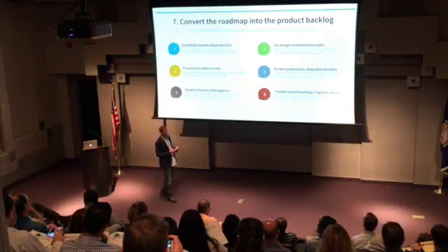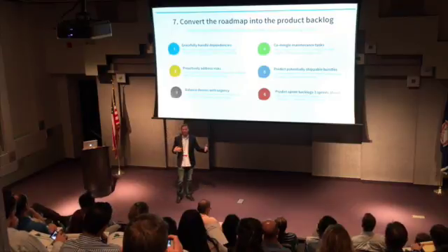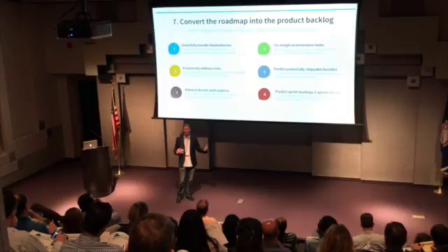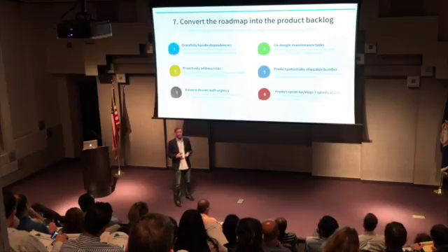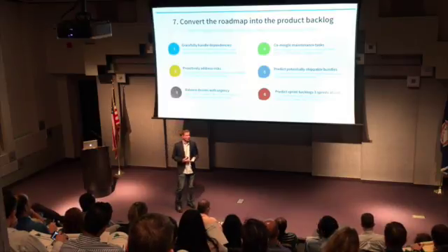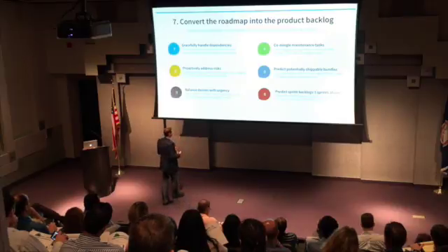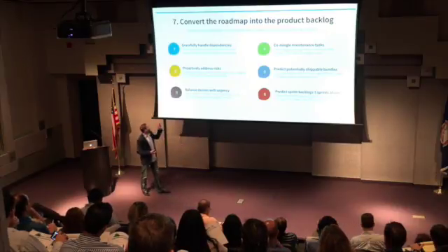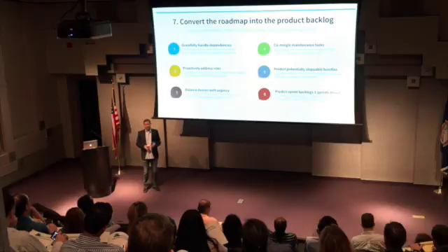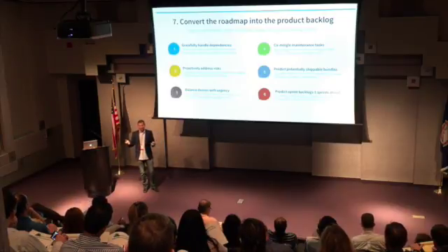It's nice to have that, but at the same time, there's a whole entire product development team working in an agile process, and they need to understand what the backlog looks like and know things down to the user story level, to the acceptance criteria level, etc. Converting it into a backlog is actually not terribly difficult. You gracefully handle dependencies. This is a matter of talking to the engineers and saying, hey, do we have an engine and a tailpipe issue going on here?